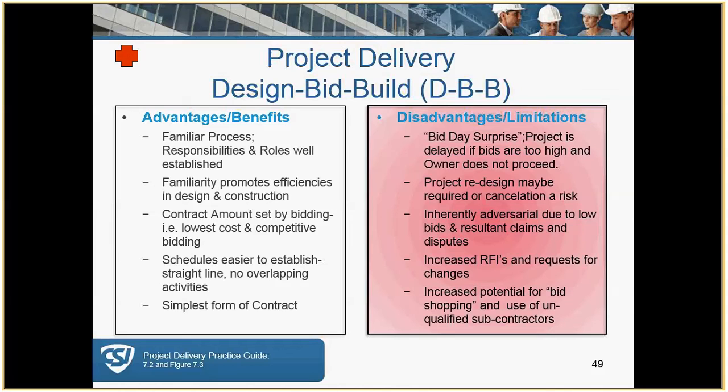We were expected to bring this in within the budget, and there wasn't an additional fee in redesign to reissue and rebid. It's inherently adversarial due to low bid and resultant claims and disputes. You do have increased RFIs, and there is a potential for bid shopping.